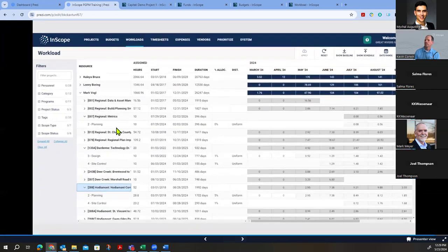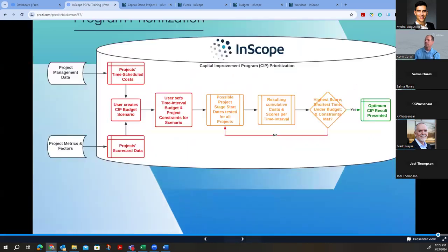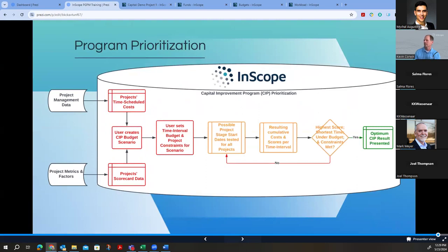And again, the only thing I have to edit, and it's not immediately apparent, is at these stages of every project for every person. I just come in here on a quarterly basis and put in some percentages, roughly what percentage of that person's time is going to be spent. That's the only thing I have to do to get this data. Everything else is automated, so it makes for a very clean and easy way. I've done this with some organizations and they really like it.